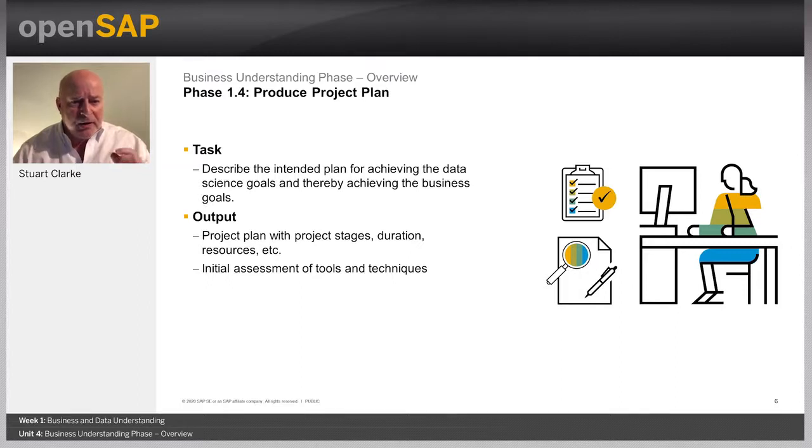The project plan is a dynamic document in the sense that at the end of each phase, a review of progress and achievements is necessary, and an update of the project plan is really recommended. Specific review points for these updates must be made explicit within the project plan.